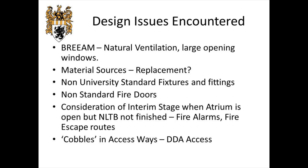DDA is another big one. Material sources — where does it all come from? Some of our materials come from China via Italy and South America. Part of the safety aspect is: if you damage one of the tiles in the atrium floor, it becomes a trip hazard and you've got to replace it. Where are you going to get one from? You ring up China, and 26 weeks later it arrives — the wrong size and the wrong colour. So material sources are a genuine health and safety issue in terms of how you're going to replace things.